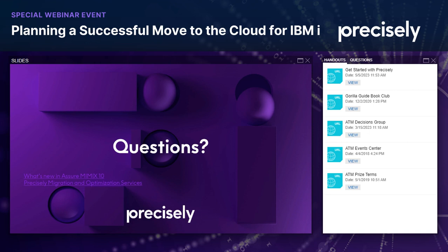Okay, next question. What are my options if I cut over to the new LPAR and it's not working? Great question again. Wow, I like this audience. Though, if you're in a tape save and restore, for example, you need to build that into your pipeline, backout plan and process. With logical replication, you can keep your other system around.